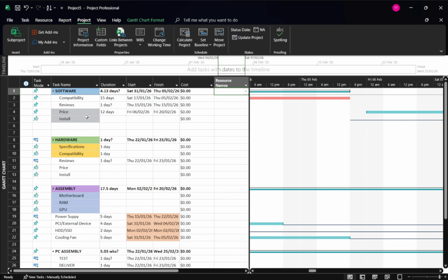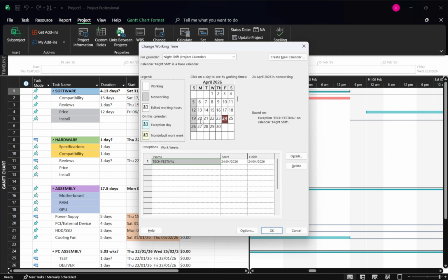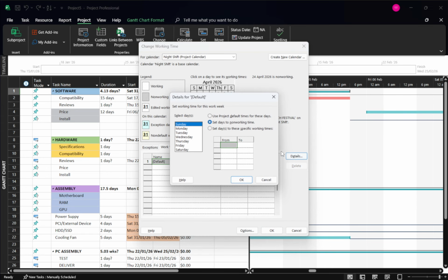For example, if your project allows work on Friday, but a resource is marked non-working that day, tasks assigned to that person won't schedule on Friday. Understanding this layering helps you interpret why certain tasks move or don't after a calendar change.